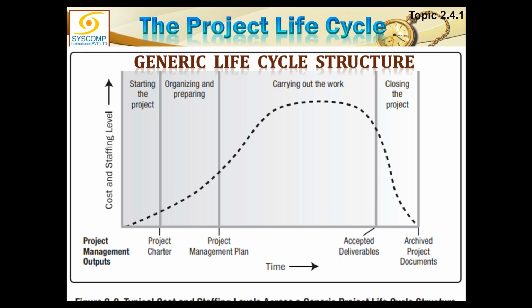When you carry out the work, the interesting part is, as soon as you actually get into the implementation of the project, your expenses and your staffing level steeply increase. That shows the mobilization in your project.